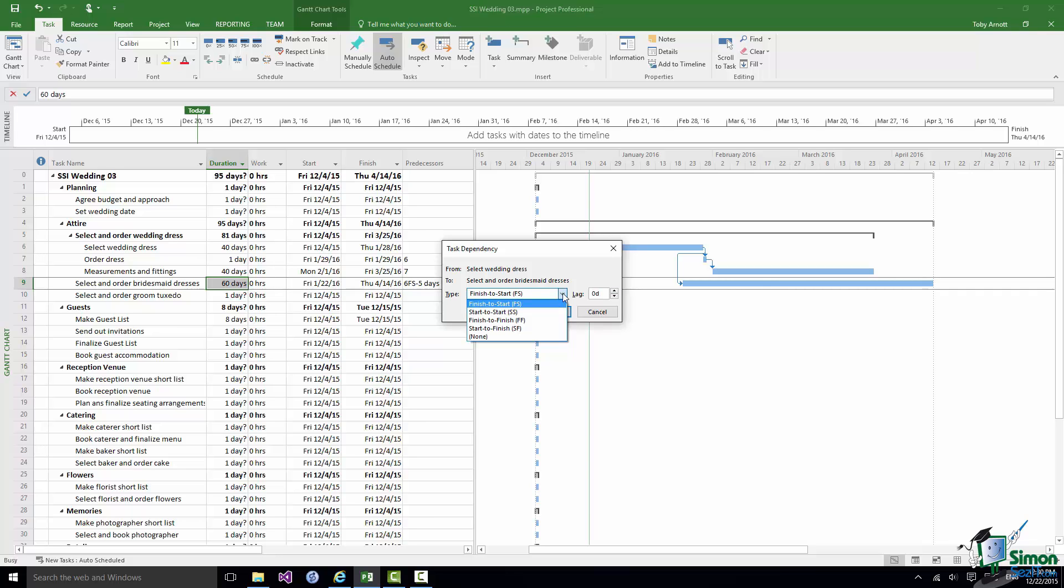There is Start to Start which means that the second task can start when the first one does. Of course you can apply lag or lead to any of these. Finish to Finish which means that the second task can only finish when the first task finishes. And there is a Start to Finish which means that the second task can't finish until the first task starts.